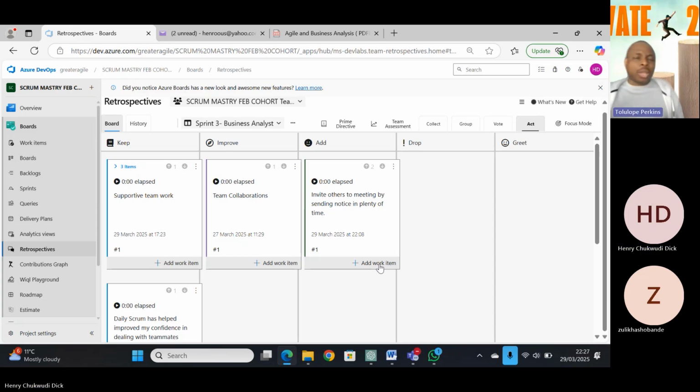Yeah, so what we're saying is that everyone agrees that this is our priority. We're talking about priority here now. Everybody has voted, and the one with the highest vote, like during an election, when a party has the highest vote, the party comes into power. Same thing here. The one that has the highest vote is what we are going to carry on as a priority, though we can carry everything into the sprint if we have the capacity.